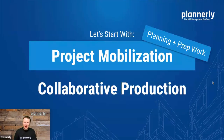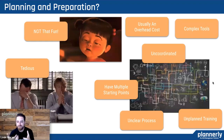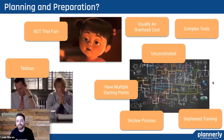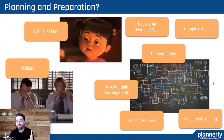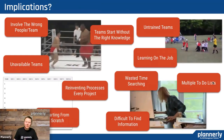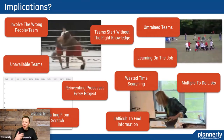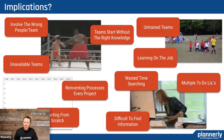Let's start with project mobilization and all of this planning and preparation work. This is the not-so-fun, more boring side. Typically it's not on project time, it's on overhead time, and this is really why things start off on the wrong foot. If we don't get it right, the implications are that we have the wrong people, maybe we don't have the right knowledge on the team, maybe we fill in that role with somebody else — learning on the job.